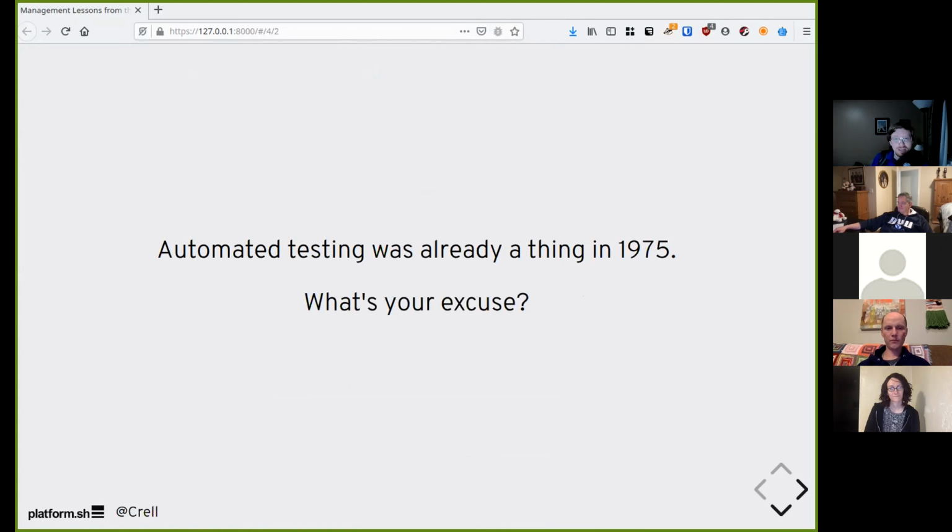No, this does not mean that writing tests takes 3 times as long. It means fixing all of the bugs that writing tests finds is going to take you 3 times as long, and you need to budget for that.